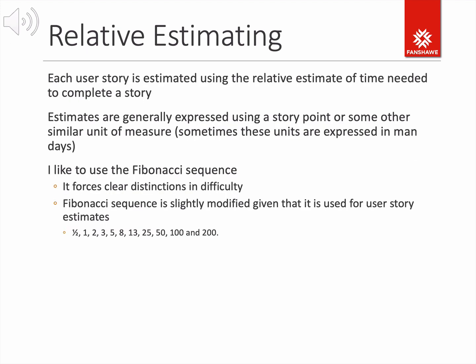So, here's another thing with the numbers. When we're trying to create these estimates expressed as a story point, as mentioned, we're trying to use a unit of measure that's really detached from person hours. Okay? Although we might start out that way, thinking that something is a 1 if it's a half day, it's still relative. Okay? And I'm going to talk about that in a couple of slides down.